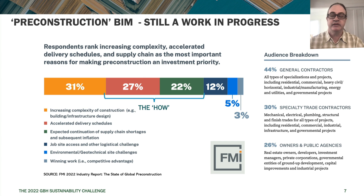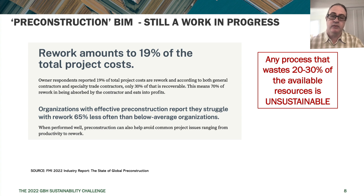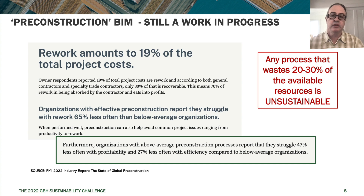FMI found that rework amounts to 19% of total project costs in their sample of almost a thousand contractors. That's not the only waste in the system. With nearly 20% rework plus additional waste, I've been claiming for the last ten years that there's 30% waste built into the engineer-to-order delivery system in construction — and nobody has really disputed that. It's almost commonly understood that that's the level of waste in the current engineer-to-order construction bidding and delivery process.